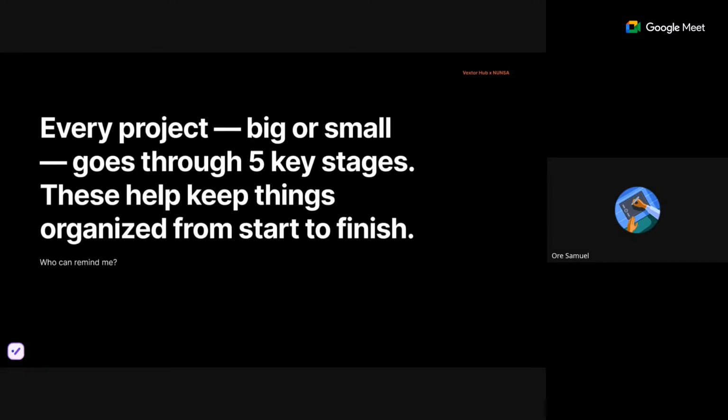This is where you create your plans, right? You assign roles, create tasks. Maybe someone is going to be handling logistics, another person is going to be handling the media, sound and so on. Create a timeline, as I said, that's making sure everything happens at the right time. What time are the graduates supposed to be seated? What time are the guests supposed to be seated? What time is the event going to start? What time is it going to end? Having a clear timeline helps you put things in order, right?